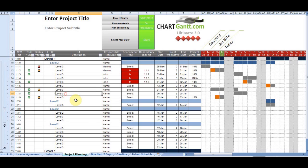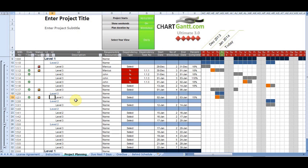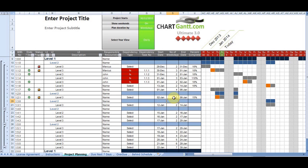So, for example, if I change this one up to a level two instead of level one, these would be your task descriptions. That task instantly becomes a summary task that summarizes and inherits the properties of the task underneath it. So just to have a look at that, if we expand this out by another day, we'll see our summary task has moved down in alignment with that.